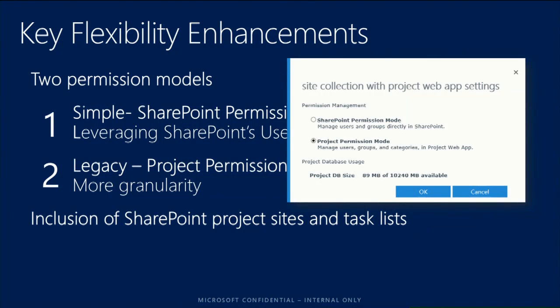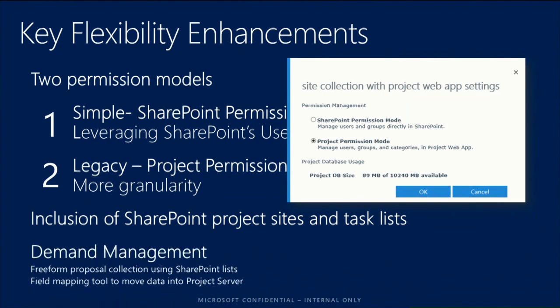I'm going to come back to that later, and tomorrow I think there will also be an in-depth session on just this topic. Demand management as well now includes free-form proposal collection using SharePoint lists, meaning you can quite easily set up a SharePoint list where you want to capture ideas, rank them and score them. And from that list itself, you can upgrade list elements directly to a project plan, or an EPT, for those who know what that is, a project type, and work with it from there by giving it more data in order for it to be approved later on by the portfolio management.